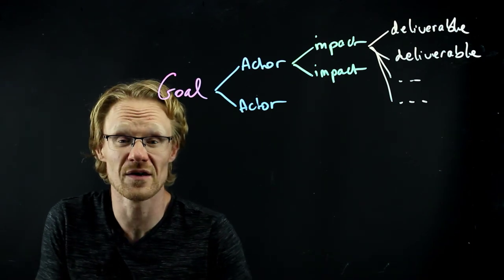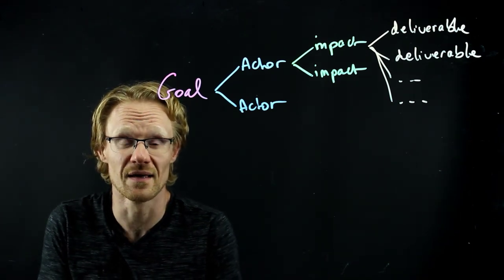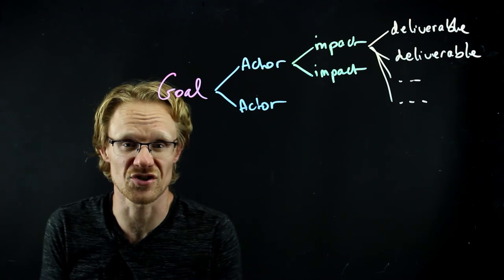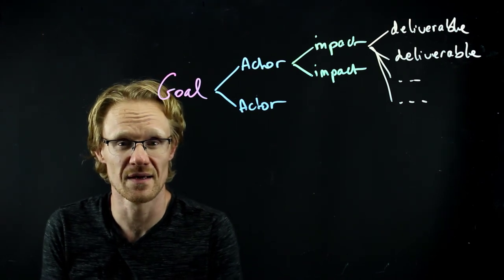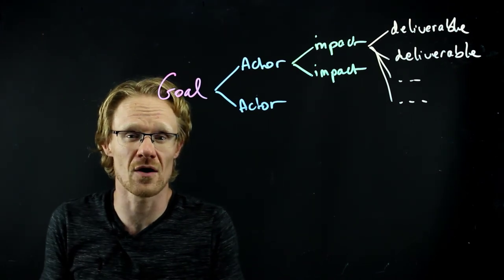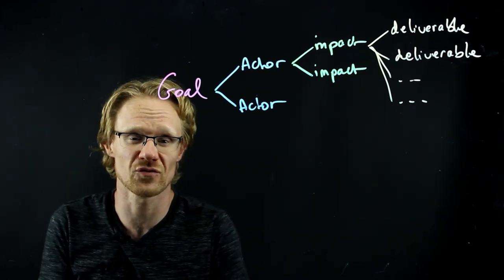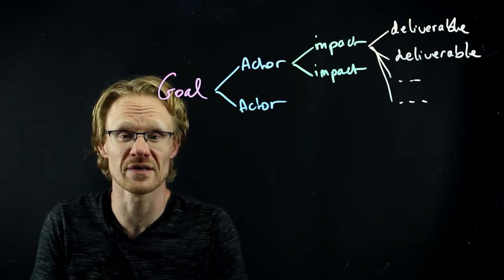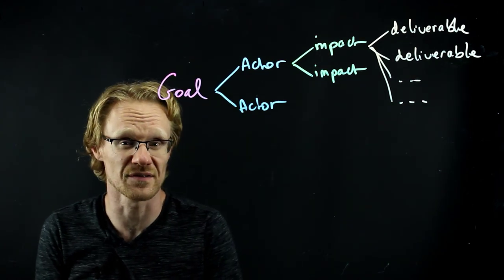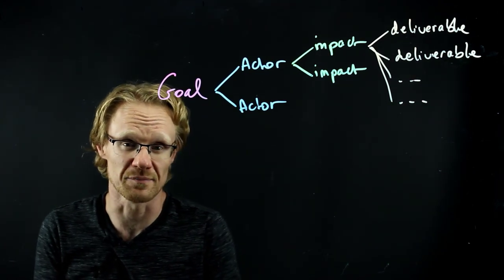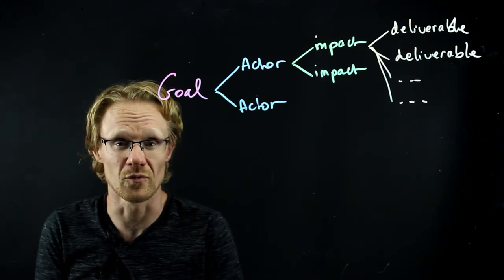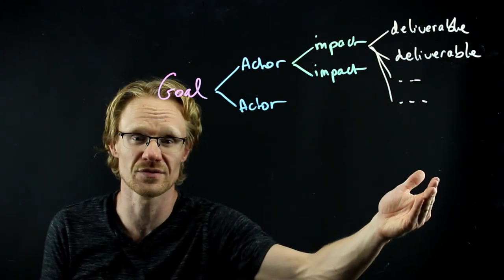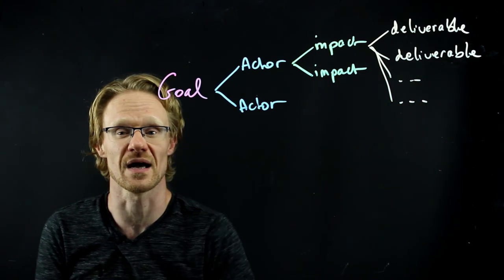And you want something you can quantify as well. Let's say you had a way to measure how much data was shared previously, and now you want an increase of 20%. If you measure that and you only had a 5% increase, well, that's a bit better, but you want more — so what else can you do from that list of deliverables to increase that?